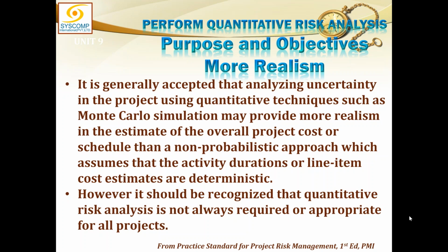3.83. So now I know that otherwise I would have taken 3 days as an estimate for this activity, but if I use 3-point estimate, there is an automatically built margin of 0.83 into it. So I will take 3.83 days, and if somehow you want to round it, it becomes 4 days. So automatic protection will be built into it. You see, the activity which I was considering to be 3 days might be placed as 4 days now, or if I take the exact value, 3.83 days now. So you can see the risk has been considered, and the estimated duration does have a margin built into it. This is in addition to all the contingencies and reserves. We are building this much protection into the duration estimates and cost estimates. Are you with me on that?